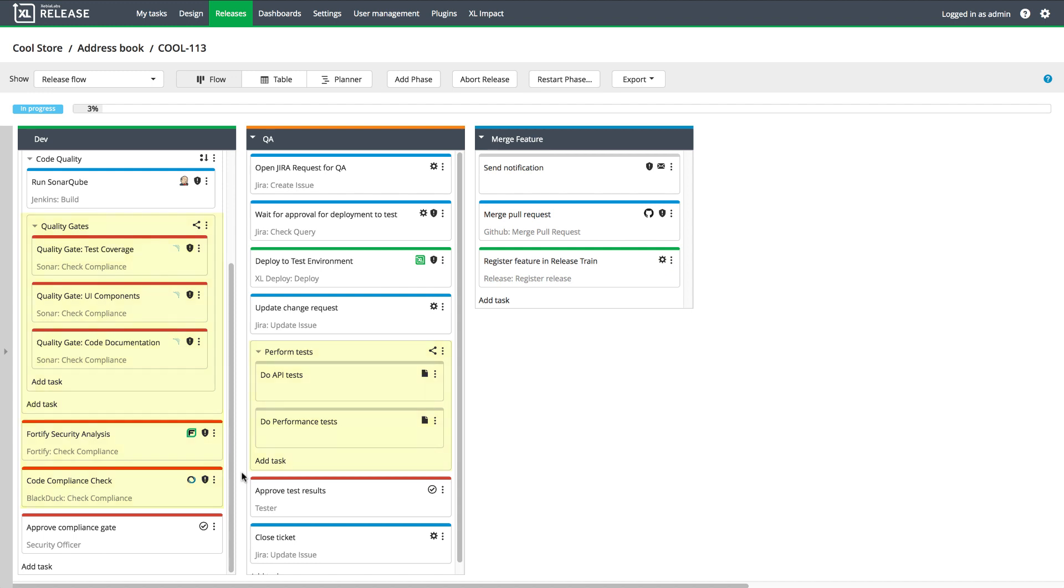The feature delivery process also involves people who do their work outside of Jenkins. For example, a security officer might need to approve a compliance gate. The QA team also has work to do, but they normally track their work through ServiceNow or Jira. Xebia Labs will automatically create a Jira ticket for QA work, and when a QA team member picks up that ticket, a new testing environment will be provisioned automatically.